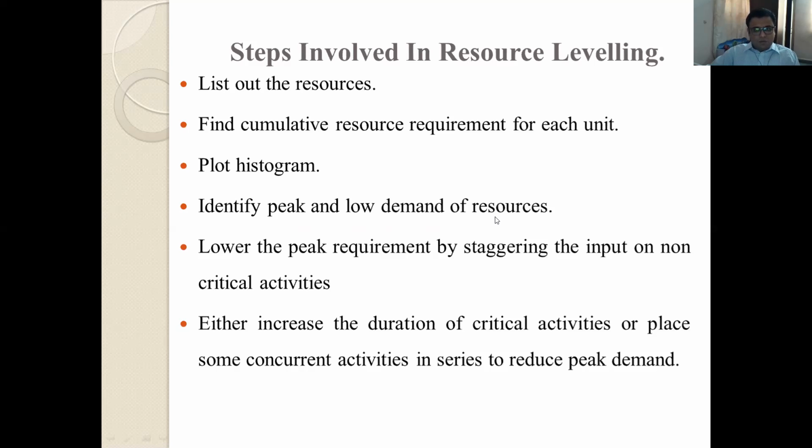Up to this, we have studied in resource smoothing. Lower the peak requirement by staggering the input on non-critical activities. This fifth step also we have studied in resource smoothing, because here what is mentioned is lowering the peak requirement by staggering the input on non-critical activities. That is, non-critical activities are shifted.